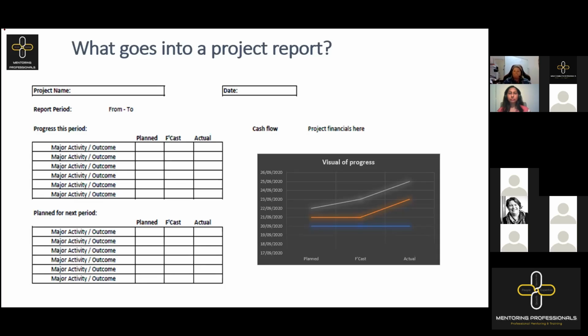What else? You may need different resources to the ones that you've already got. You may need different skills depending on the scope of the CR. Good. Yep, that's another good reason. That will come as part of that impact assessment. So these are all important pieces of information. It enables the board to make a formal decision. It could be that that CR might in fact derail our project altogether. We might unwittingly incorporate something that takes our project out of alignment.